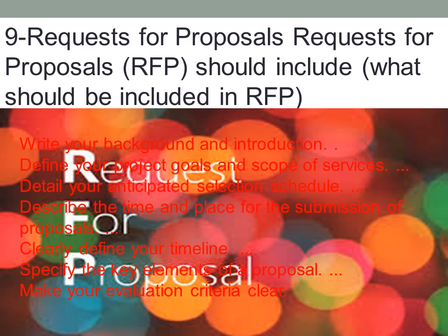It should have the proposed project goals and scope of service, and any anticipated selection schedule. Describe the time and the place for the submission of proposals, clearly define our timeline and specify the key elements of a proposal, and also make our evaluation criteria clear.